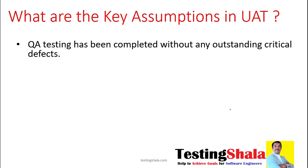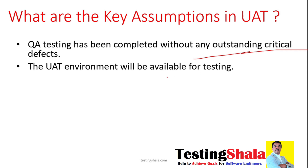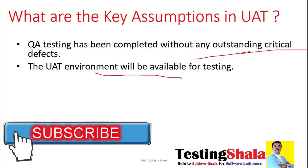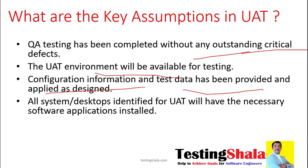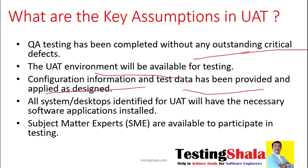What are the key assumptions in UAT? The first assumption is that software testing done by the testing team should be completed without any outstanding critical defects. The second assumption is that the UAT test environment should be made available. The third assumption is that all configuration and test data has been provided and applied into the environment, and all system and desktop requirements for UAT testers have been identified and all prerequisite software applications are installed.